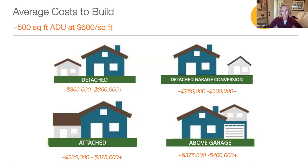Putting an ADU over an existing garage has become a popular way to create a unit without losing yard space, but there are additional costs associated with these units that you need to be prepared for. Finally, please note the square footage price of construction goes down as the size of a unit goes up, because of the intrinsic costs of mobilizing a construction team. Building 800 square feet or more could actually lower the square footage price.